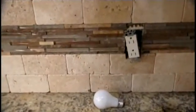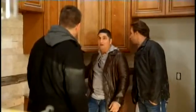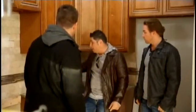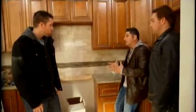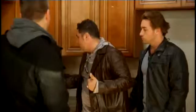He used the wrong adhesive. He used the floor tiling adhesive rather than a wall adhesive, which is a lot stronger. So when the backsplash was put on, it dropped down about 1/4 of an inch, smashing the inside tile and popping it out a hair. We're gonna have to rip this out and individually put each piece where it's buckling out. That's the only solution here for the timeline and the money. When I saw that, I was kind of disappointed, I think because I'm losing money on time, on labor.